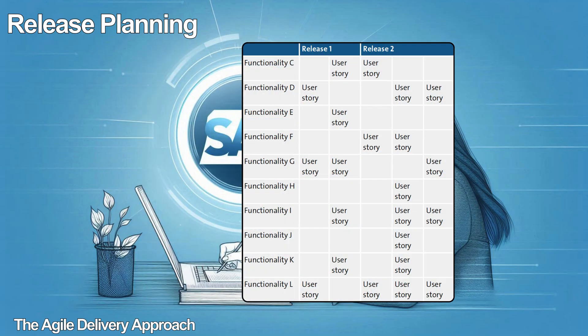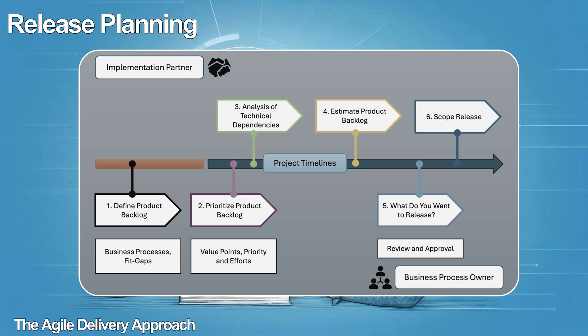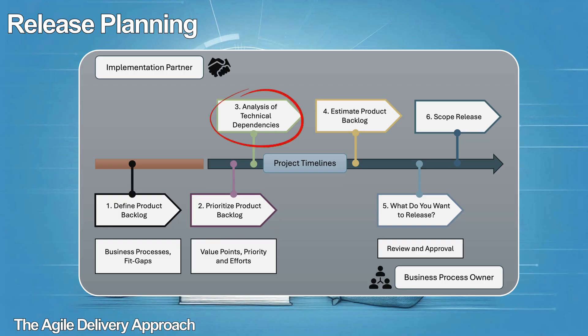The six steps in release planning are: firstly, define the product backlog, where the team identifies the required business capabilities in the solution and any additional configuration, extension, or integration. After that, the team prioritizes the product backlog as a second step. Thirdly, they carry out the analysis of technical dependencies. It is important that the development team identifies the technical dependencies to ensure that the user story is ready per the definition of ready and delivered per the definition of done.